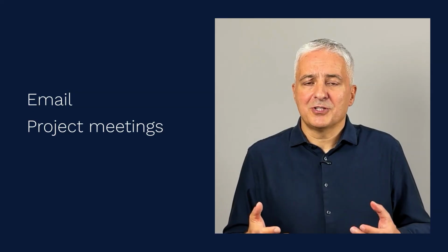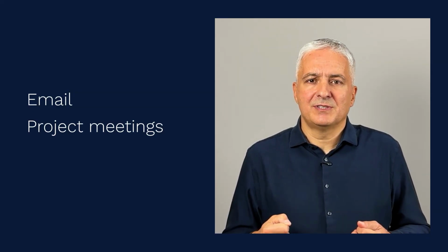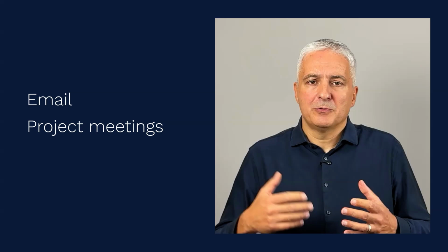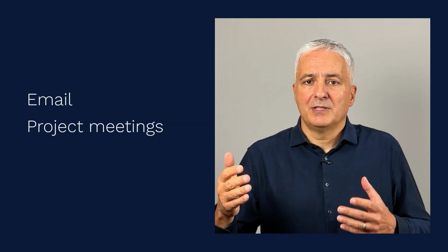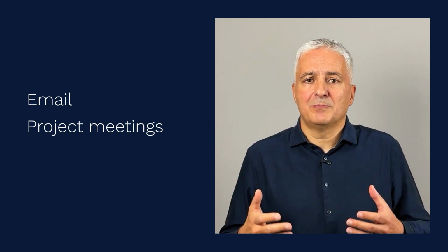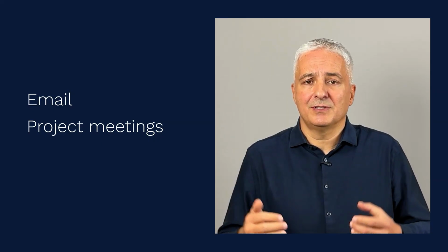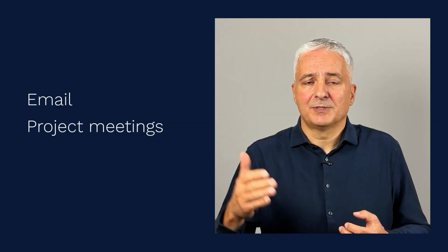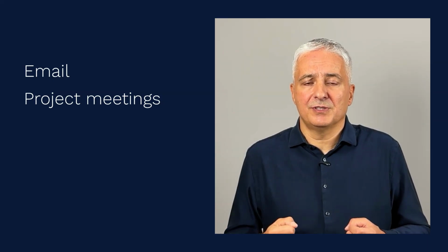Further, you will need to have these formal project meetings, which can happen, let's say, once a month or maybe once every 2 weeks, where you will actually compare your progress towards milestones, and where you have to discuss all kinds of problems that will typically appear during the project and how these need to be resolved. Typically, these problems will be so that some people within the company are late, that they are not responding to your messages, these kind of things.